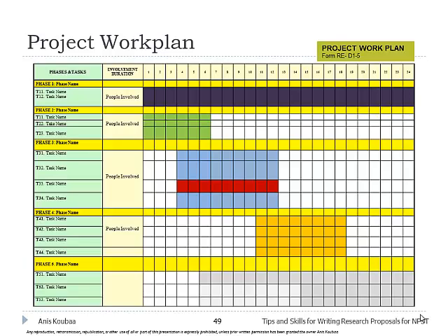And the project work plan, this is a Gantt chart where you write the different phases, and the task name in each phase, and then people involved, and then you make an estimation about the duration for each phase. Okay, you can see it can be overlap between the different phases. And this is also important because if you write for it after 6 months, you will have a progress report.